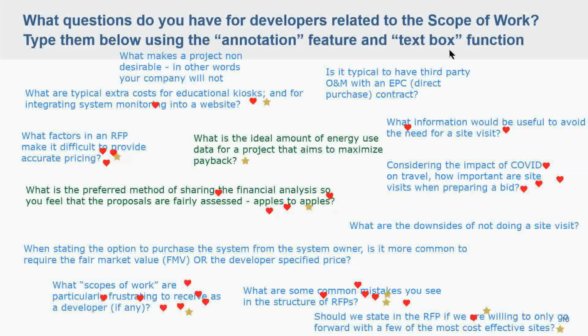If we don't share utility bills, we will share load and number of interconnection points. Load per meter is really important if you're having to interconnect to multiple meters. And then, the other thing that you can lean on a developer for, we do it in-house with our analyst team, is that they would run a solar offset rate.